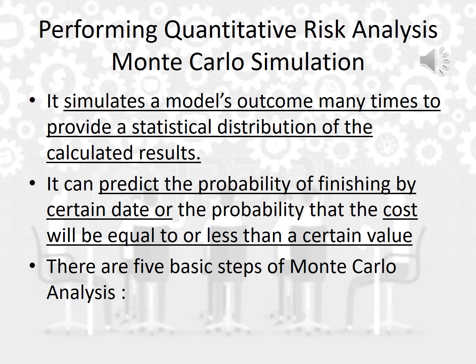What is the benefit of using Monte Carlo simulation? It can give me the prediction probability of finishing the project by a certain date. So if I start from today, it can predict for me the probability of finishing my project, based on the plan, the project documents, and the calculations I mentioned before, whether I can meet my due date of finishing the project or not. That's one point. Or it can predict the probability that the cost will be equal to or less than a certain value.